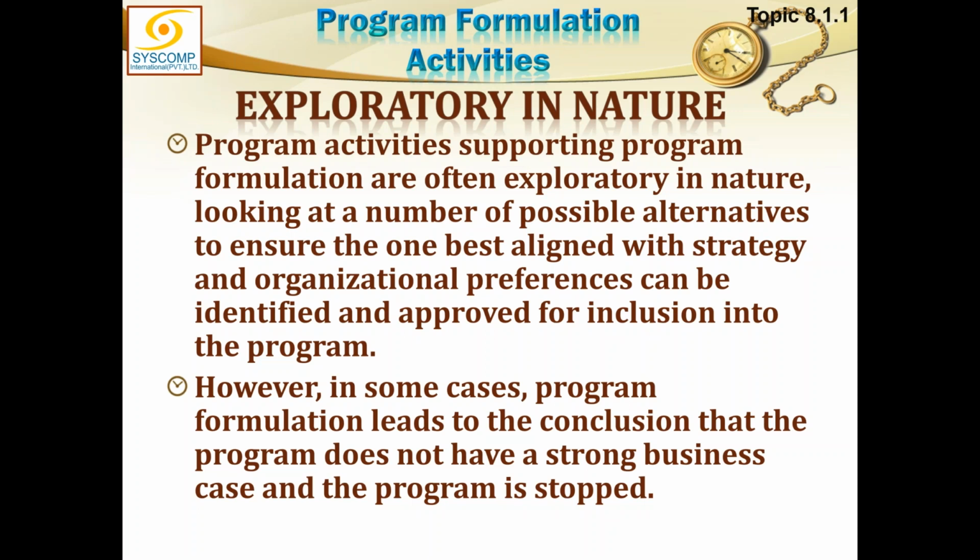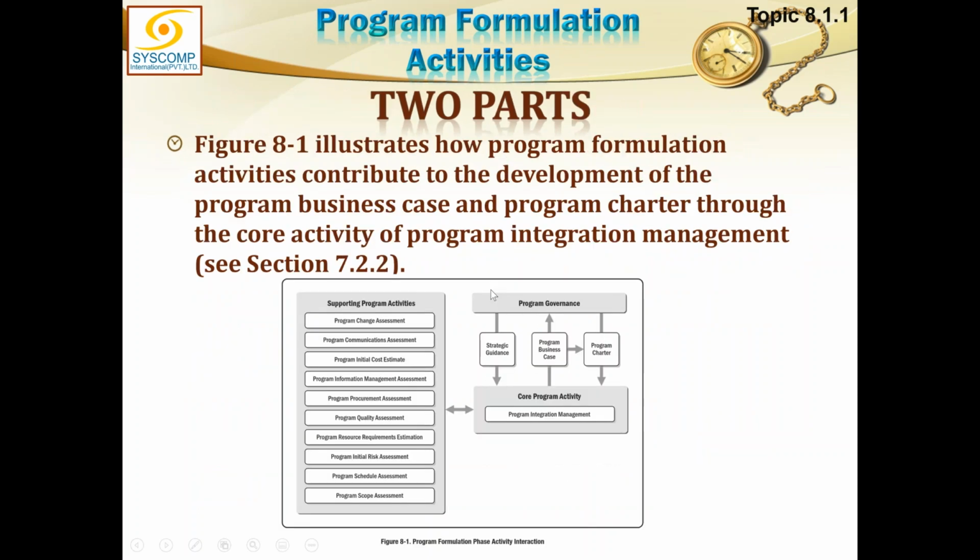So once we are doing the business case, we must look at all the various possible alternatives and which is the best one. However, in some cases, program formulation leads to the conclusion that the program does not have a strong business case and the program is stopped. So right at the outset, if the program is not feasible, it is going to be killed right here.